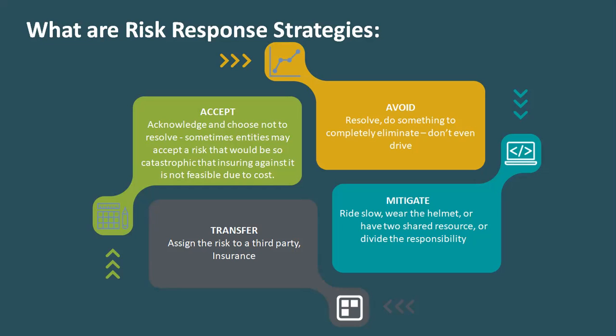But yes, sometimes in this case we mitigate it by wearing a helmet or a seatbelt, leg guard and stuff, right? Or in the ship example, when we are transporting our shipping container from point A to point B, we don't take insurance. We accept the risk. Okay, let's accept it. Whatever happens, we'll take it. Right? But that's not a very good way of responding to a risk, because we suffer losses if that situation actually happens.